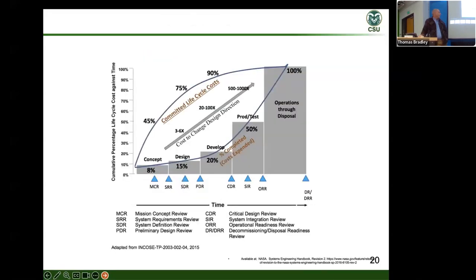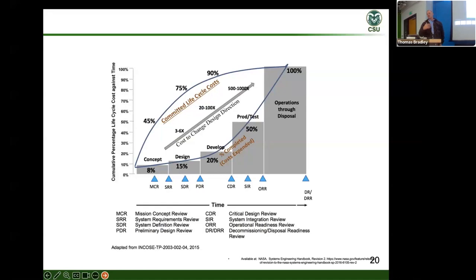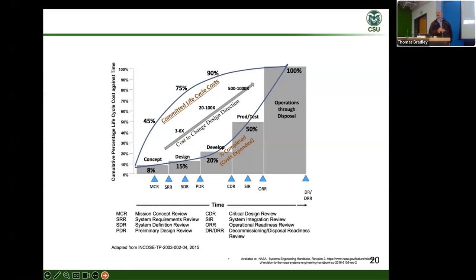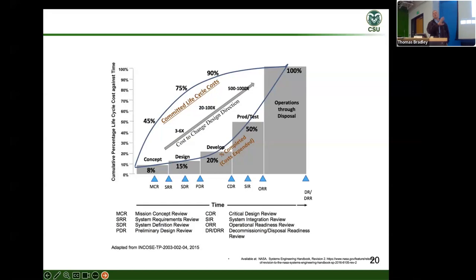How does that happen exactly? One of the key things that builds the case for test is that you don't just do work — you have key milestones and review points along the acquisition process. You have checks and balances along the way: you do some work and then verify or validate that work to gain confidence that yes, in fact, we are doing things correctly. You go a little further, have another design review or check and balance, a milestone — the idea is you don't get to the end of a program and realize you didn't build it right.